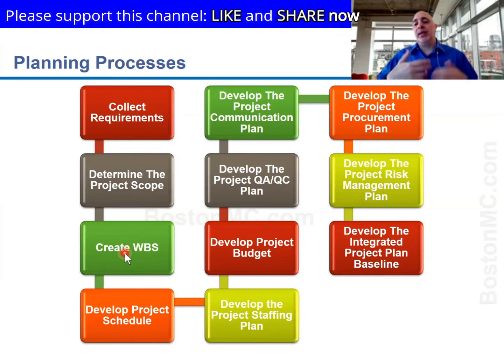And for every piece, there will be a different team that I would assign. And we, along with the team, will come up with the schedule of activities that they are going to do to complete their portion of the work. Now, if I can link the activities from one group to the activities from another group, I would eventually have a proper schedule for the whole project. I will know who has a dependency on somebody else, and that will give me a proper schedule at the end.